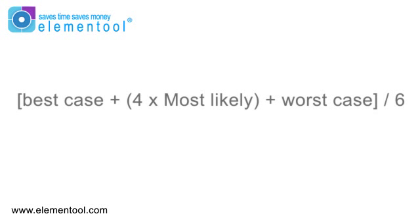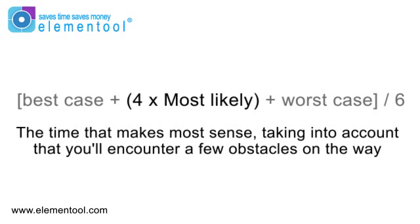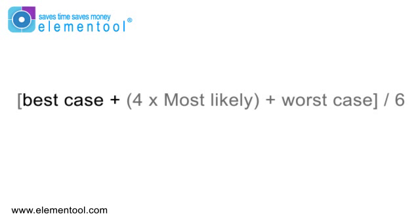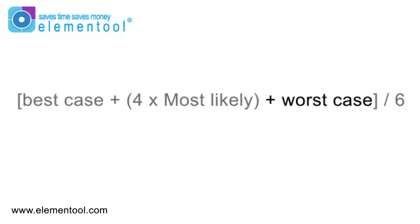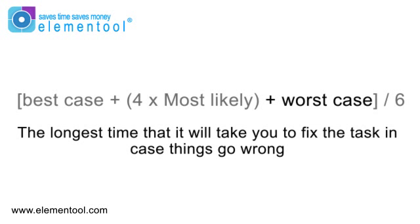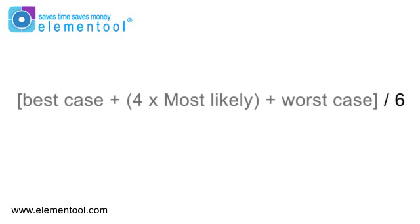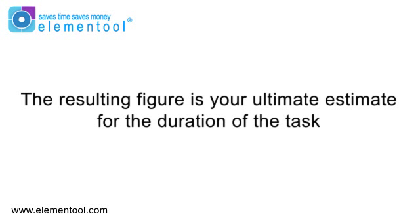The formula goes like this. Multiply the most likely amount of time that it will take to finish the task by 4. This is the time that makes most sense, taking into account that you'll probably encounter a few obstacles on the way. Then add your best case scenario time — the fastest that you can complete the task if you have everything that you need and everything goes according to plan. Now add your worst case scenario time — the longest time it will take in case things go wrong. Sum it all up and then divide by 6. The resulting figure is your ultimate estimate for the duration of the task.